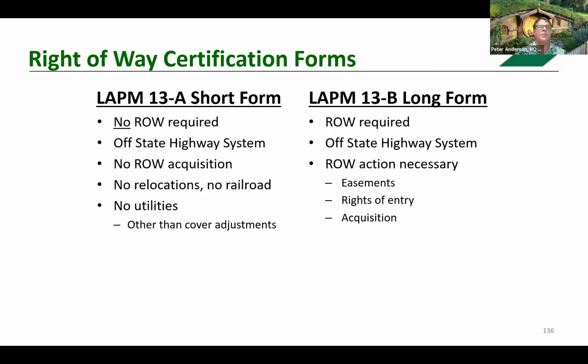The one thing about CEQA is you, the local agency, are providing the environmental documents. Those environmental documents need to cover the scope. CEQA is the local agency. They're the responsible entity with regards to CEQA. The Caltrans state has no responsibility on that. So we do not have anything to say as to when it needs to be recertified. It's up to the local agency to make that determination.